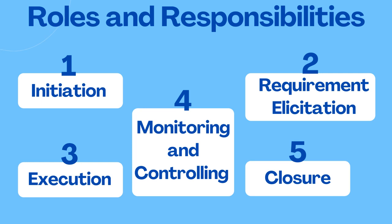The fourth phase is monitoring and controlling, where the project is measured and controlled for deviations from initial plans. This phase runs simultaneously with the execution phase. Responsibilities include conducting user acceptance testing, creating testing reports, gaining acceptance of deliverables from the client, explaining change requests to the development team, and monitoring the development of change requests.